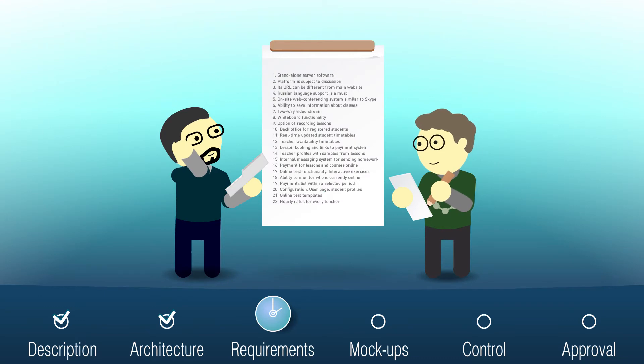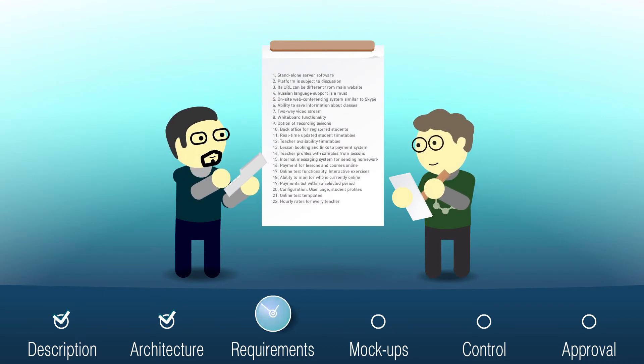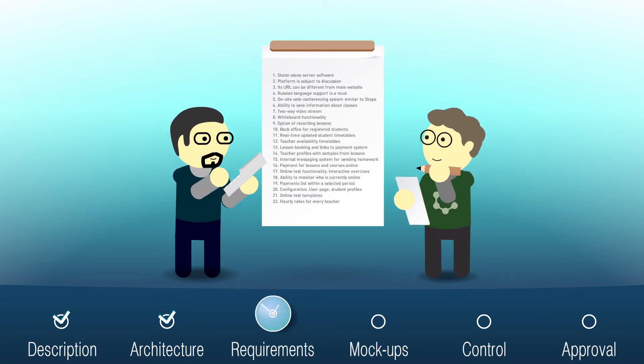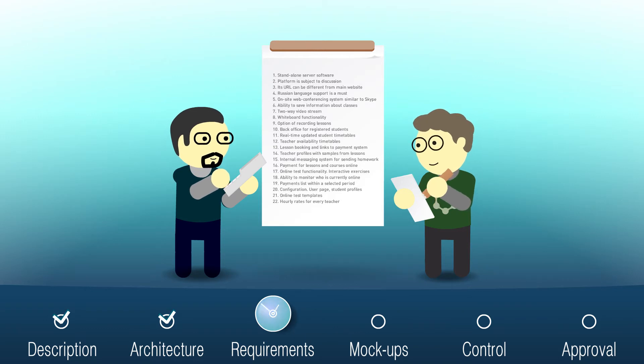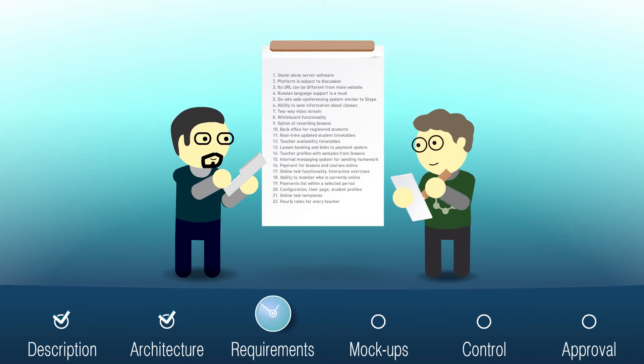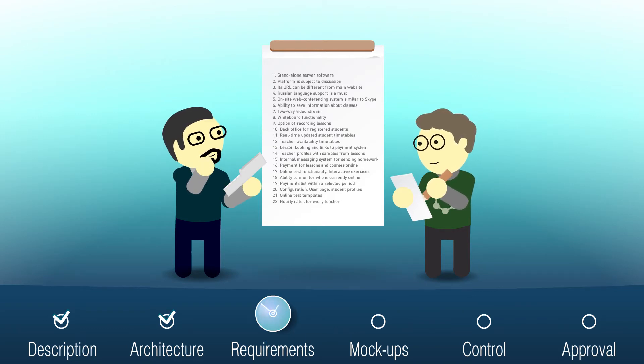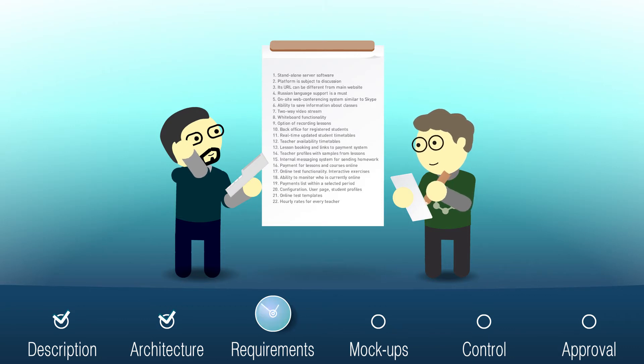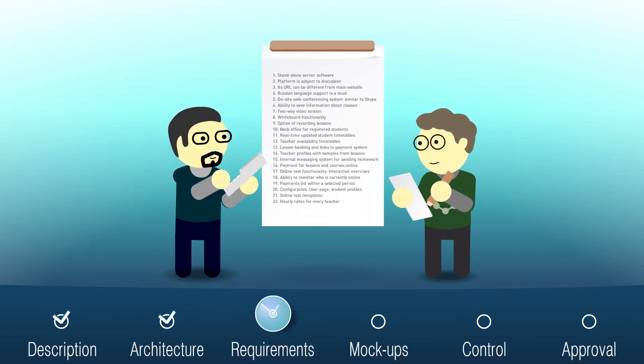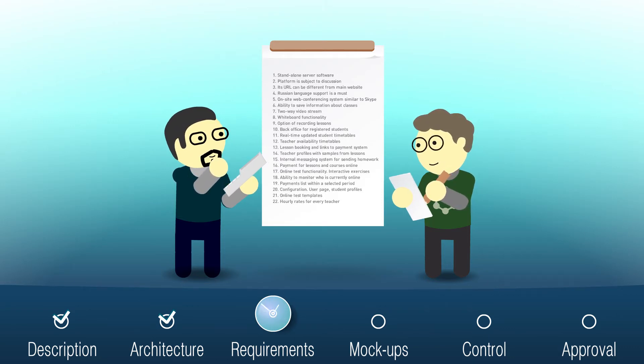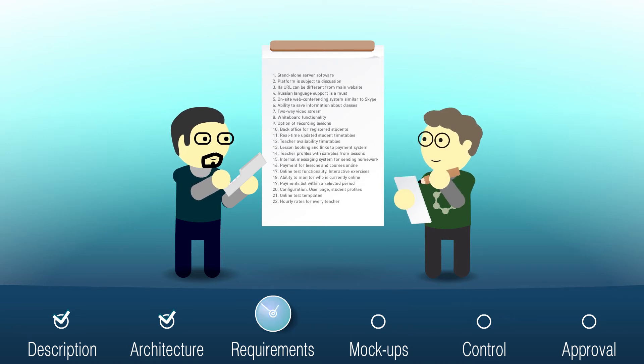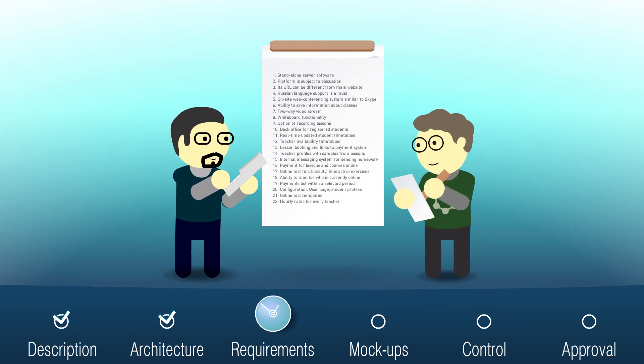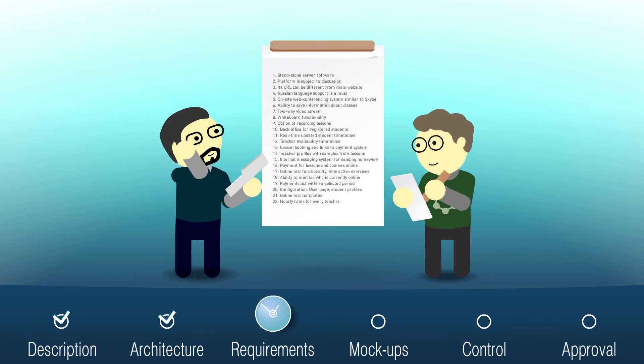Each clarificatory step in defining a final specification is called an iteration. There are usually three or four iterations during a project. The first involves the preparation of the document by the architect, the second involves coordination with the project manager, and the third deals with any issues you raise as our client. There is no limit on the number of iterations, and much depends on your specific demands and the complexity of your project.